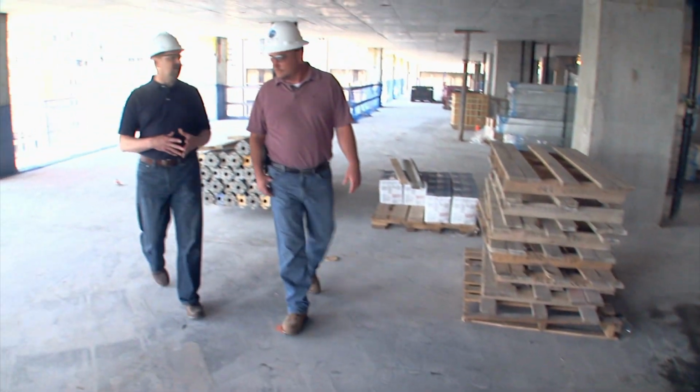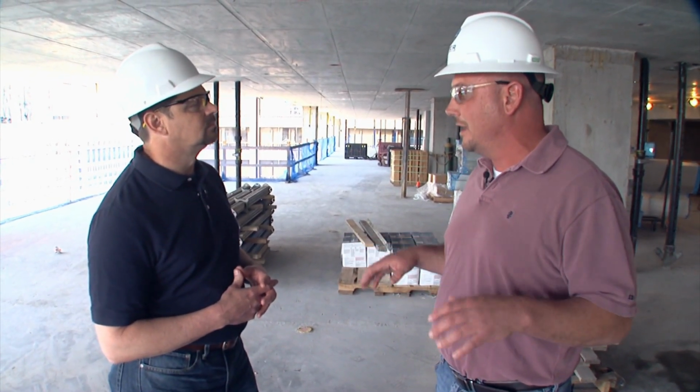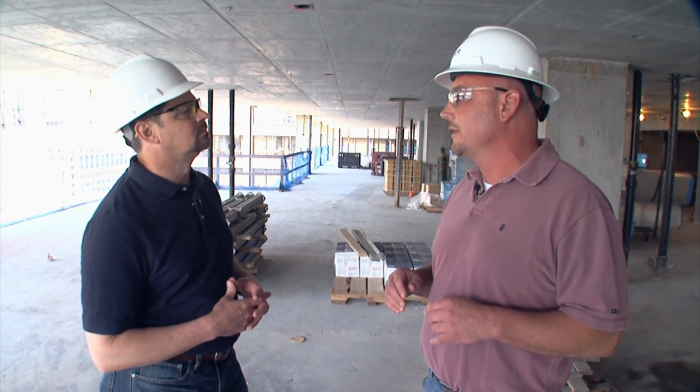So Jeff, we're here up on the 23rd floor. Kind of what's taking place here? Well, we're actually in a transition phase, you would call it. We've already removed the reshores from the building, and the carpenters have been up here, laid out the floor, snapped all the control lines for the interior walls and the MEP finishes to start. But the first thing we got to do is get the building enclosed. So the next phase of this is going to be putting in the exterior envelope. Once the envelope's on, we'll go ahead and start the interiors and MEPs.